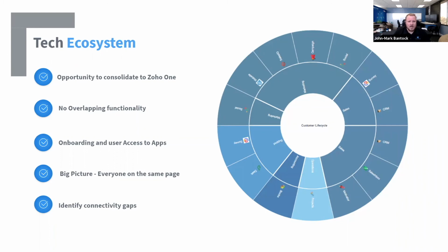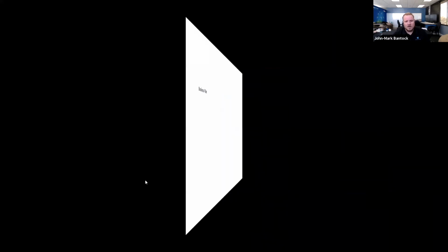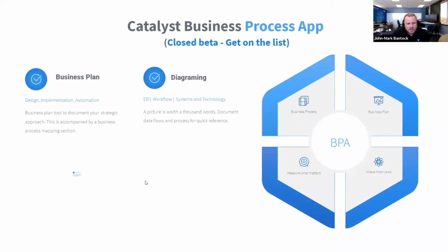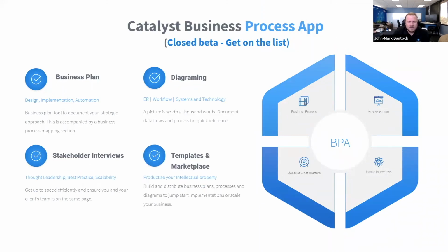So in our world, what we do is we have this whole intake process, right? We're discussing a little bit about the stakeholder interviews, the business processes. We talk about entity relationships, and we talk about the whole tech ecosystem. All of that information is just that, it's information. There's no plan behind it yet. And we actually assimilate that into now that project plan and that scope of work. The project plan paints this roadmap, this larger picture of where we're going to go over the next 18 months. And that's typically how we frame it.